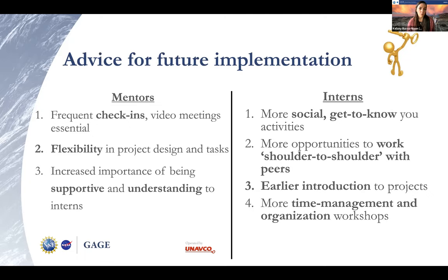One example that I'd like to pull out was someone who said to try to create several different versions of the project plan in advance. Like an ambitious plan, a moderate plan, and a conservative plan in terms of progress and scope, so that if you have to dial back, you already have a plan in place. And then increased importance of being supportive and understanding to the interns.